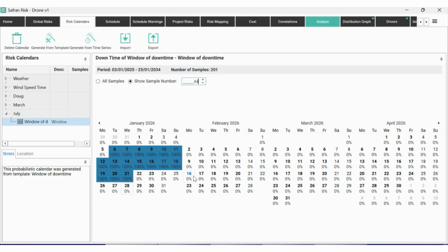So this is the one which we would use if we had just a single block of time. We might also use this for things like planned maintenance on a particular industrial unit, where every year we need to do some maintenance. We don't know exactly when we're going to need to do that. We're going to be led by our readings from the instrumentation control room or something, and we don't know exactly how long it's going to take us once we get in there, because until we see what the state of the unit is inside. And so we're looking to model this maintenance shutdown turnaround time for this particular industrial unit, this one solid lump of time.